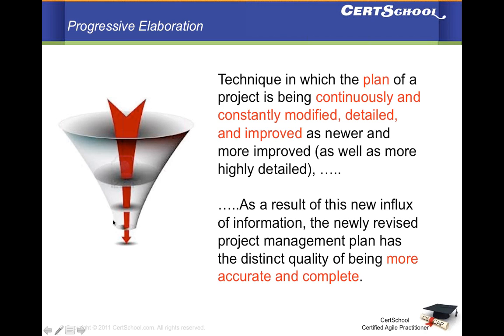I've shown this photo of a funnel on the left hand side here. The reason for that is, imagine that you're starting any project, it starts with a very broad scope outline. Okay, so imagine it as a funnel. You're at the top here when you're beginning, and as you find more information, as you do more surveys or more research, or you start collecting information from different stakeholders, the scope of your project starts narrowing and becomes more focused. Okay, which is why it looks like this funnel.